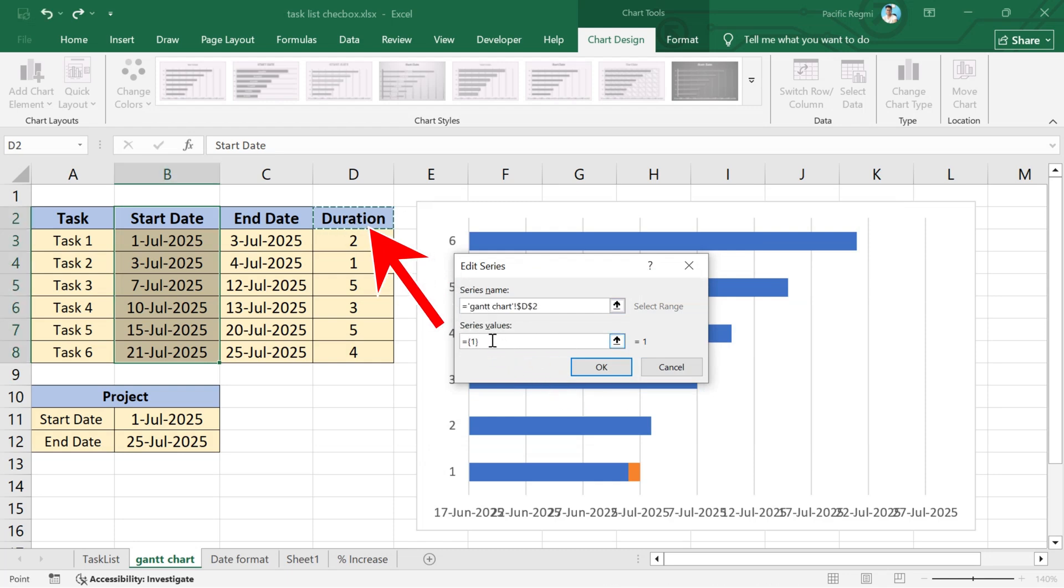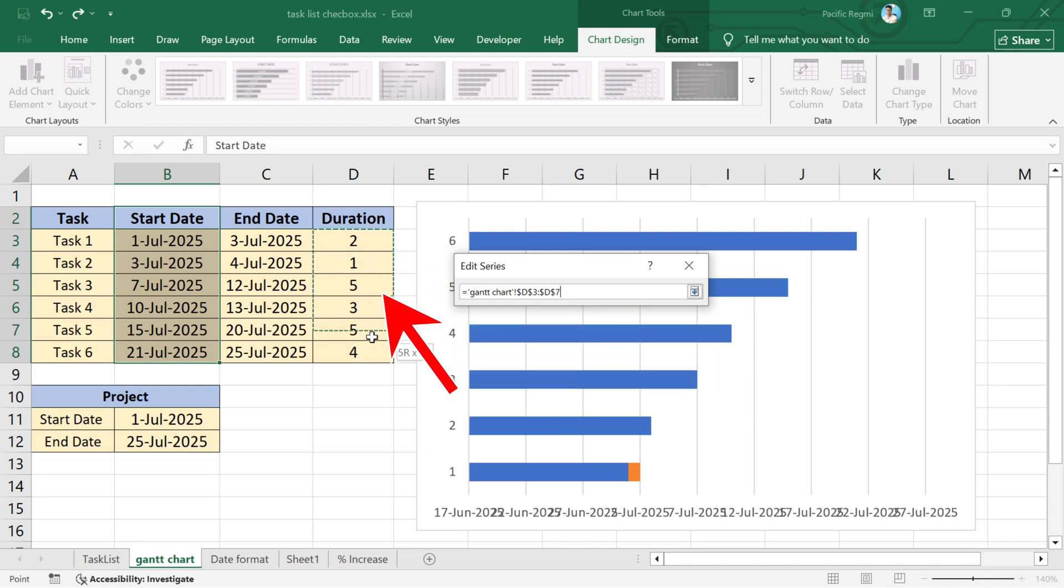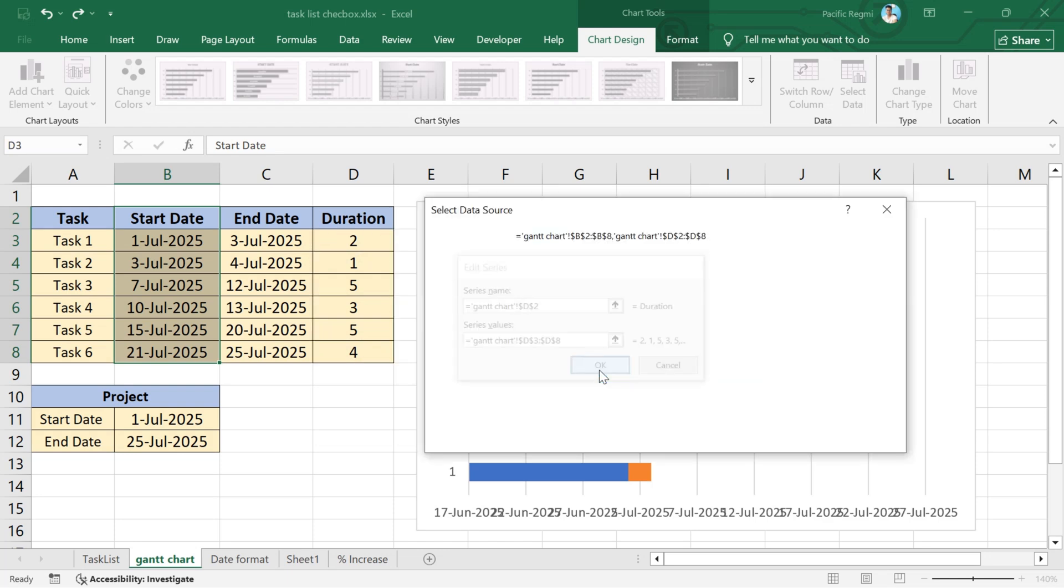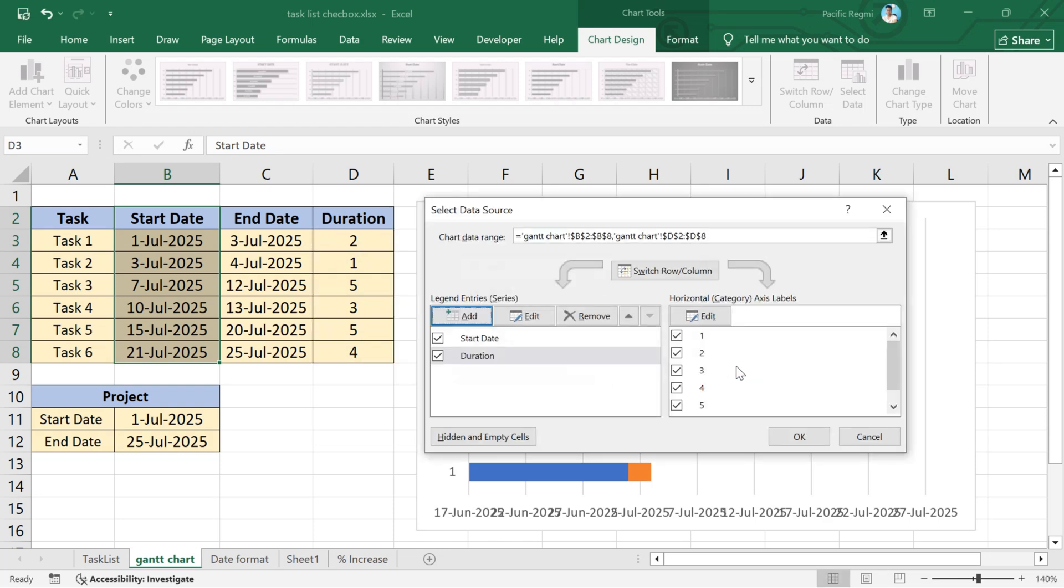After that, go to series values, remove the default value, and select duration values from the table. Once selected, click the OK button.